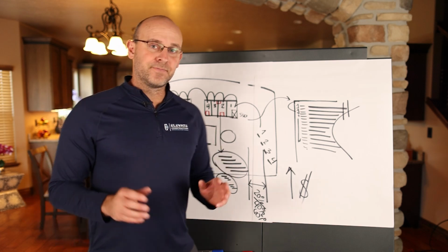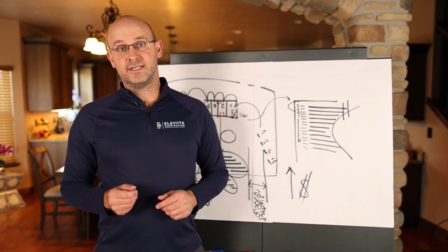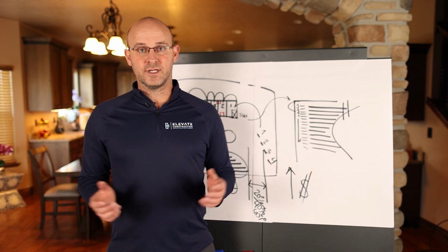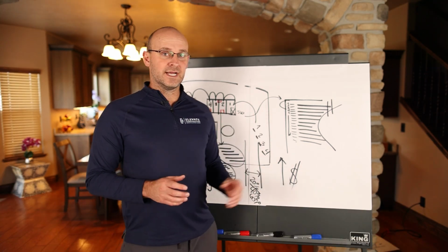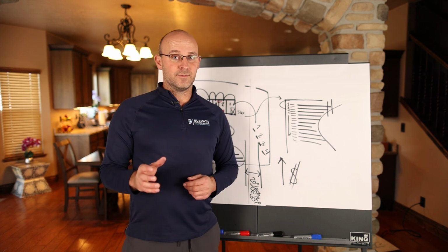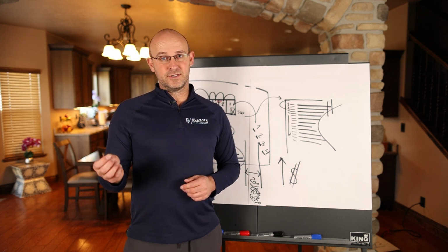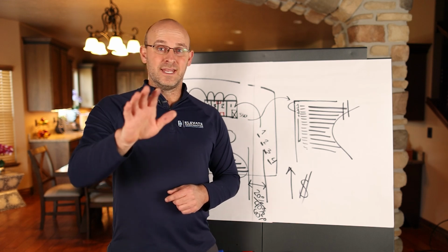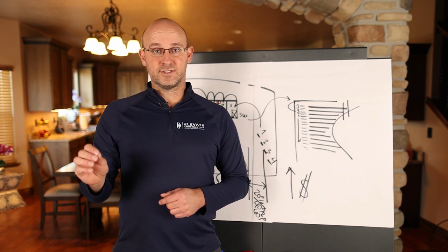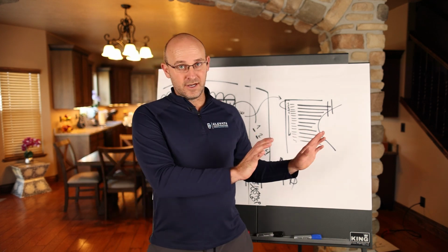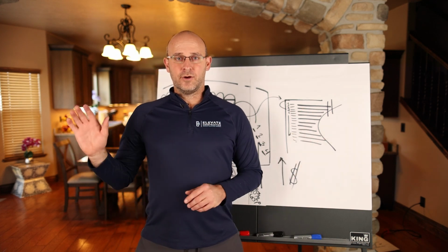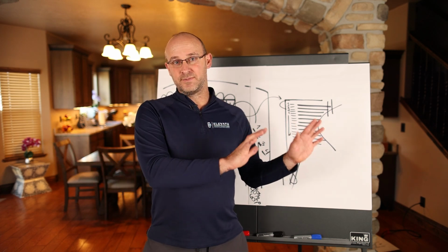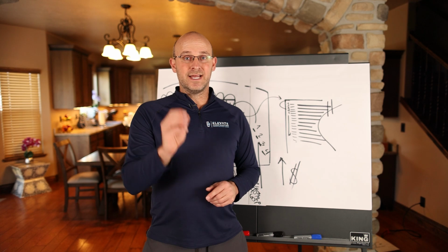Now, some of you are thinking, J Money, this is great, but what about cabinets? They take forever. What about gypcrete? It just interrupts the entire flow. What about my framers? They're unruly. Every project where we implement Takt planning in this system on a multifamily project, and you have a committed team or a committed general contractor, or you ask us for help, you can get them into a leveled and even flow and leverage your superpower, which is repetition. So you can't worry about how fast your fast trades are going. It only matters how fast your slowest trades are going, and can you get them all going the same speed, the same distance apart. That is absolutely key.